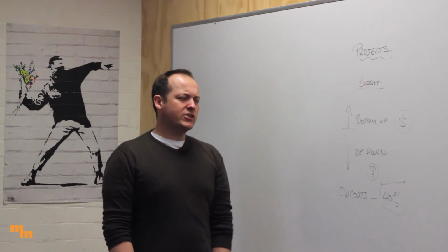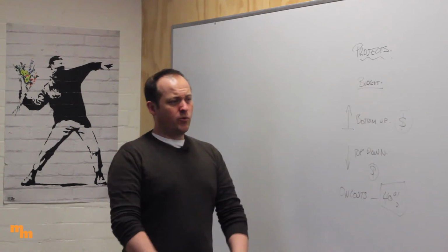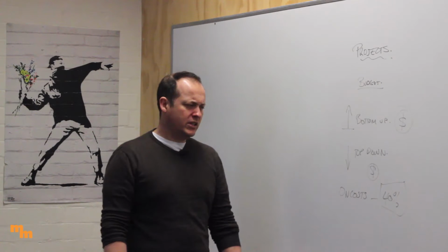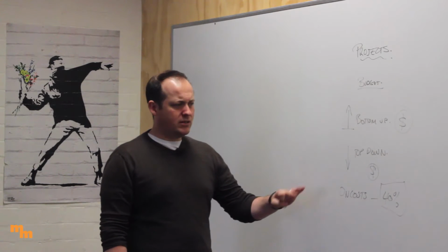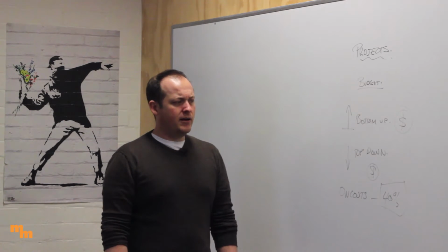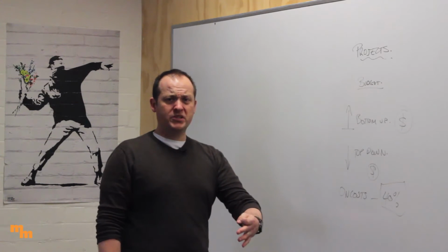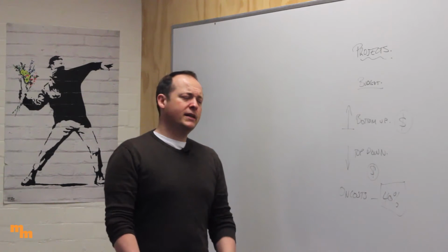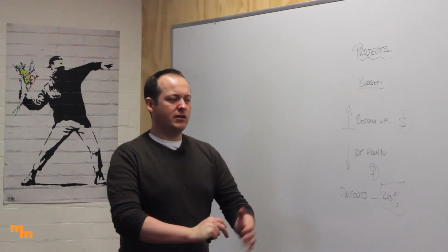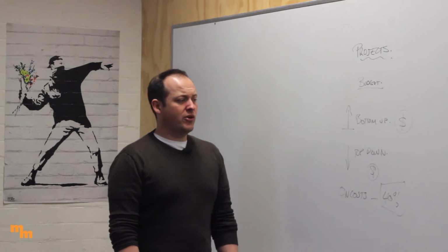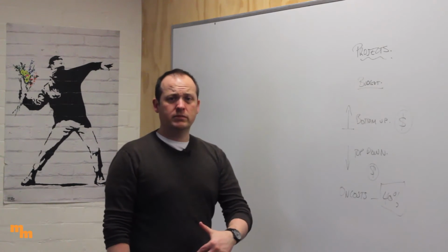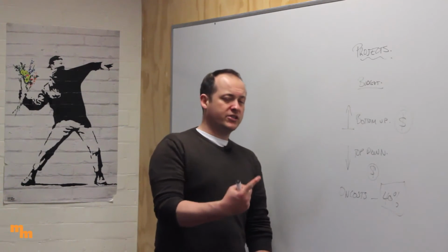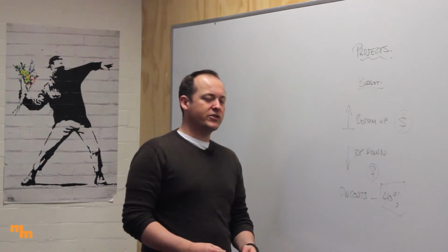Labor cost is a funny one, because often people don't include their own cost. They work out what everything else costs, and they know how much that is, but then they forget to pay themselves. Right? Don't be that person. Make sure that you actually factor yourself in there as well, especially if you're looking at business, because you can't rely on goodwill forever. You're going to have to pay someone eventually. So working out when and how, if you're doing it now, now's a good time, because if you don't end up spending it, awesome, then you save dollars. But if you don't factor it in and then you do end up spending it, it's going to blow your cost out, and that's not going to be so awesome because you go over cost.